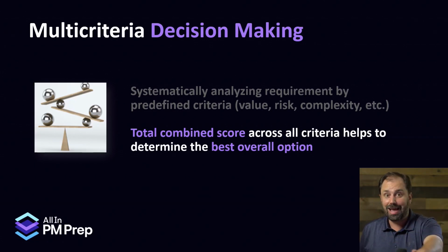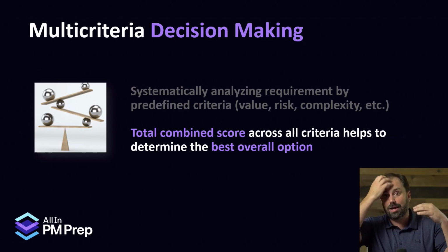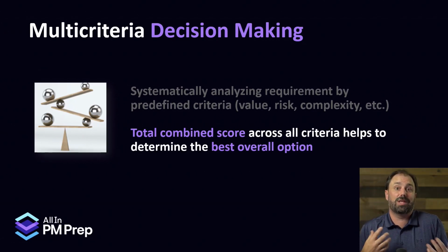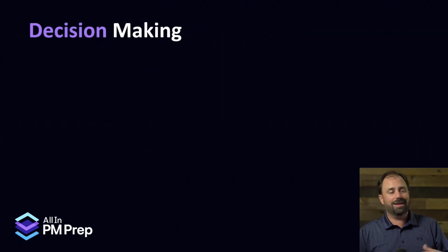So it's a way to evaluate each requirement based off some defined criteria that make a difference to you guys. And you could say, hey, this is something where we need speed. So its complexity and its risk, we're gonna rate those super high, and things that rank well on those categories are the ones we're most likely gonna do because we know the scenario of our project. So that's one way. And at the end of the day, sometimes you just got to call the ball. You got to make a decision.